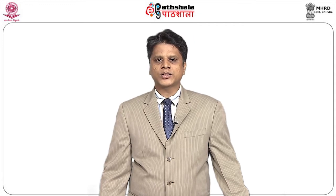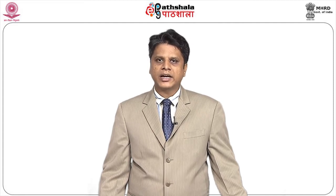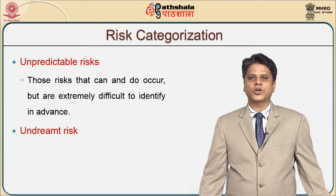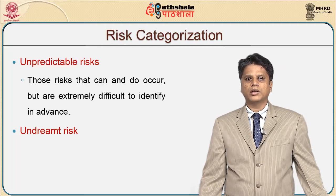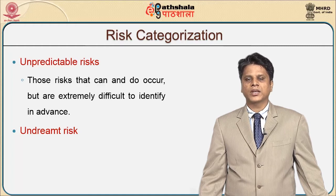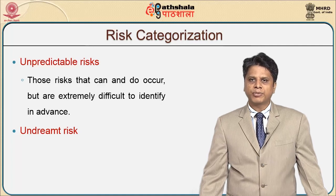We have another risk called predictable risk, wherein in advance we are able to understand and figure out very clearly that there are certain areas which could lead us to a problem. Those risks extrapolated from past project experience — which becomes past turnover — become your predictable risk. The third category is unpredictable risk, where risks can and do occur but are extremely difficult to identify in advance. There are areas where we cannot predict, and we are uncertain about these risks.